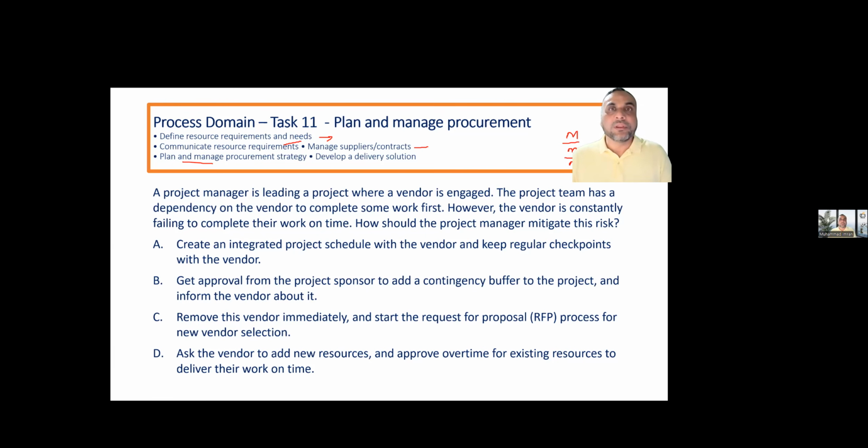How the payments will be released is based upon OPAs. If the suppliers have a different requirement, how can it be handled? According to your organization policy, you can only take the things and then pay, or you can only pay 50%. But the supplier is saying, no, pay me 100% advance. We don't have any policy like this. If you want, take it, or leave it. If they are a sole source, they are the only one, so you have to modify your terms and conditions for that.